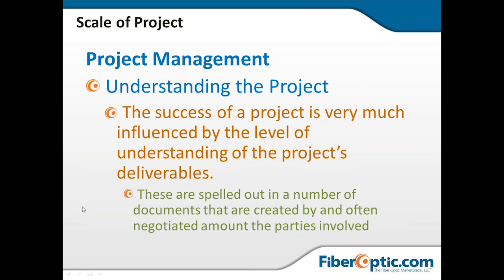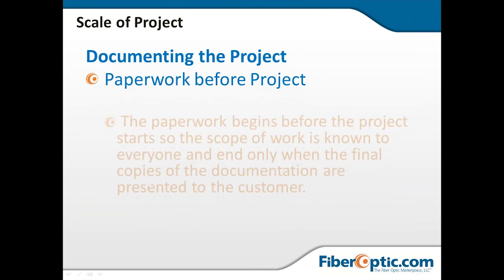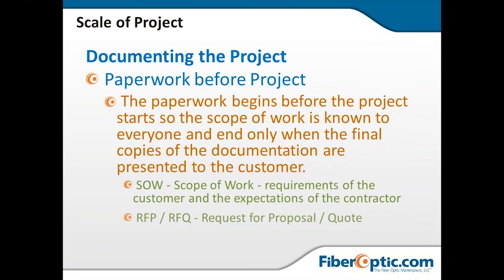That's a very important part of any kind of project: the prep time that goes into preparing for a project. And that paperwork before the project should be things as we have down here: statement of work, which covers the requirements of the customer and the expectations of the contractor. They need to be clearly defined. Are you going to potentially put an RFP or RFQ together, which is a request for proposal or a request for quote? And then also, do you have a signed contract with your either your customer or your contractor with those clearly defined deliverables outlined so that there is no ambiguity? We rescue a lot of projects.